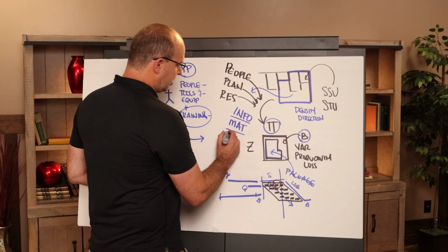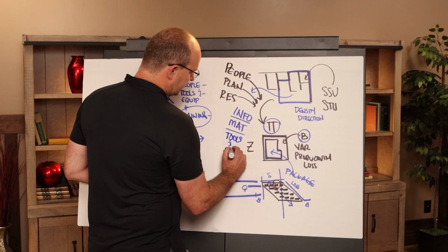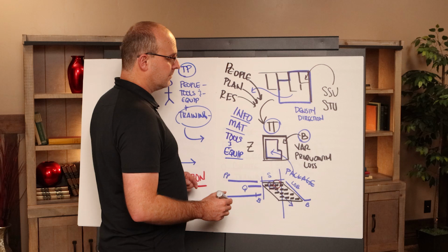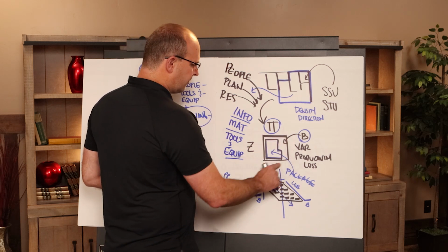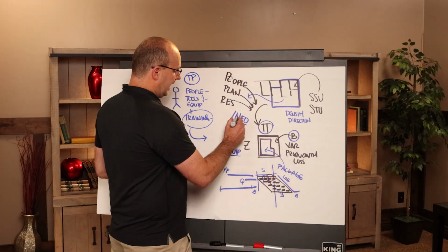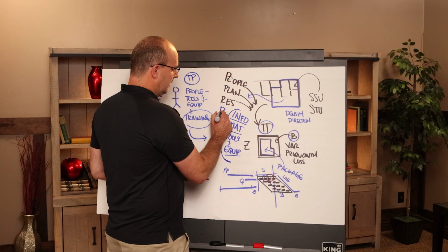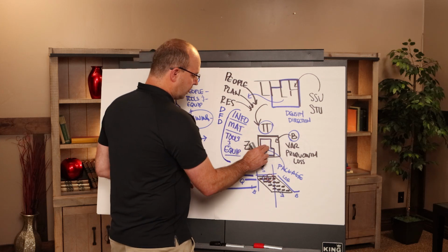And when the trade partner comes, the tools and equipment should be packaged before the work happens or the morning of, right on time, so that workers can start. Could be or should be designed for that work package in that zone. And everything is based off of the pattern of design, fabricate, deliver to the job site according to that work package.